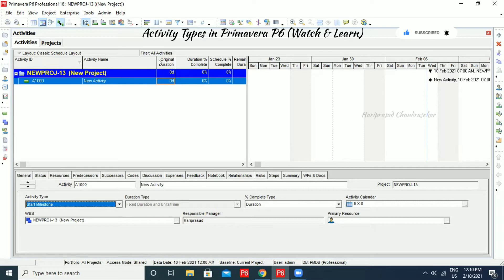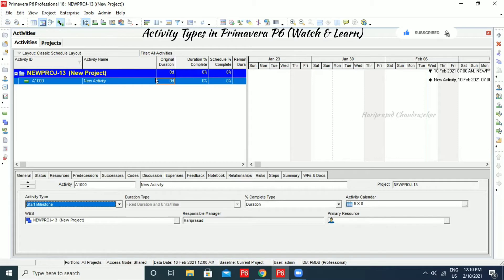Because milestone activities can't have any duration. It's just like a milestone — like an achievement. It is just like marking the beginning of a project, something like that. It has only the start date.